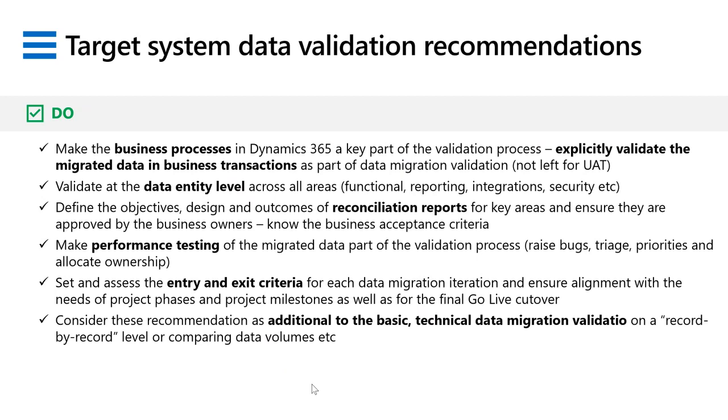And sometimes it means you have to borrow resources from the functional team to say they're going to conduct the business transactions to make sure that the data landed in the target system is clean and good. But whatever means you do it by, I would strongly encourage you to think of that data migration cycle, or that mock cutover cycle, is not complete until the data is validated to make sure it's fit for purpose in the target system, right?